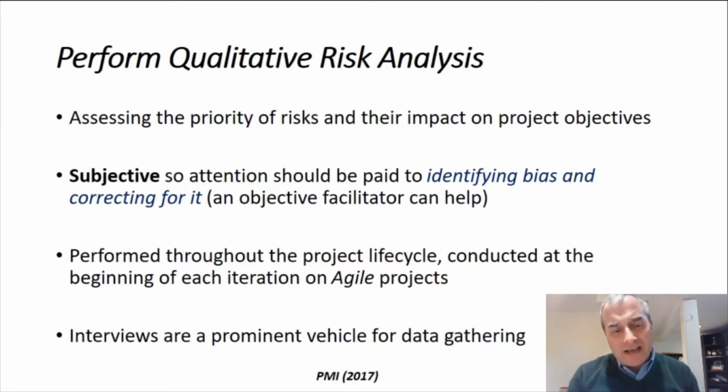Now, qualitative risk analysis is performed throughout the project lifecycle. It's conducted at the beginning of each iteration during agile projects. Now, in qualitative risk analysis, interviews are a prominent vehicle for data gathering.